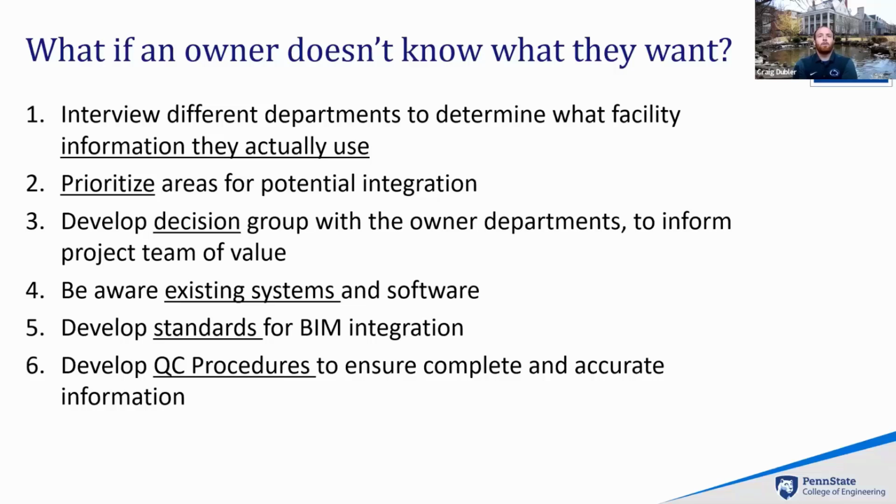Good question. So Heather asked, do I have any idea of the percentage of responsibility of who's filling out that asset information? It's about 25% designer, 75% contractor. As a matter of fact, we also have the contractor validate the information that's in design through the submittal phase too. So that's part of the process. So a lot of times probably it's the designer who's actually just putting the line item there, and then the contractor who's filling out the data.